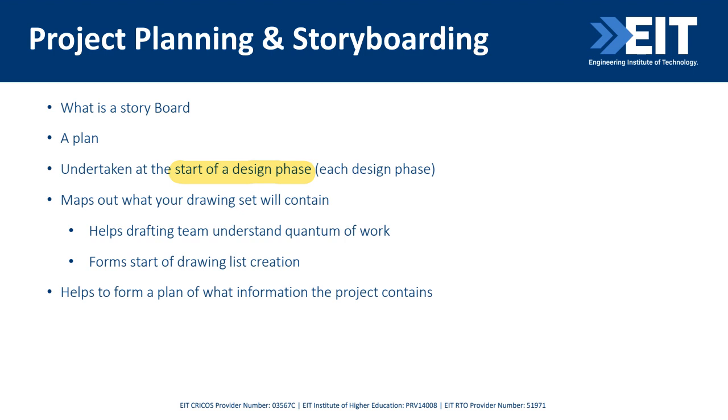What other avenues do you need to think of that will form part of your design process? And the reason this is useful is because we can quantify how much work is actually needed. So a small project may need fewer drawings, and therefore it might need less drafting time or modeling time.